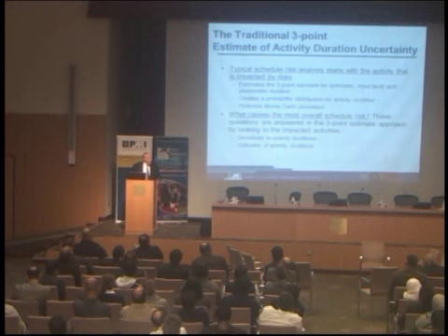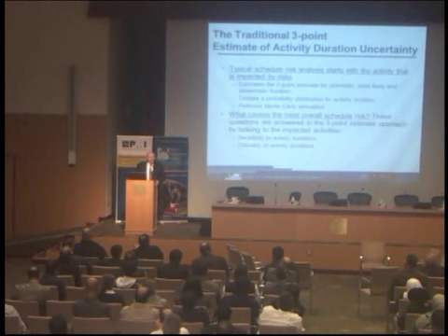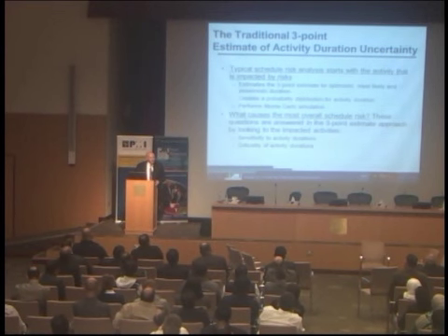But you know that the definition of a risk is an uncertain event or condition that, if it occurs, has a positive or negative impact on at least one objective, right? So it's got an uncertain possibility of occurring. Where is that represented in the three-point estimate? I used to argue that it was represented in the three-point estimate, but I was wrong. It's not really there. It's just a three-point estimate of impacts.